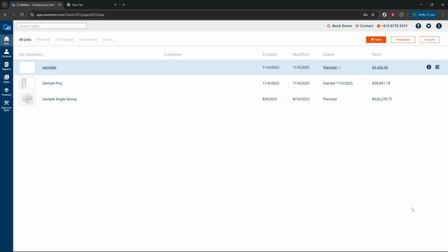Just next to your project dashboard, you can also click on the Status dropdown to manage and update as your project progresses. If you're ready to start work, click Start on the project status to move it in progress. You'll then see it listed there. When you reach completion, update the status to Completed. This simple update allows you and your team to keep track of how many projects are in various stages of completion. By returning to the In Progress or Completed tabs, you can easily view projects based on their progress, which is especially useful for managing multiple tasks at once.